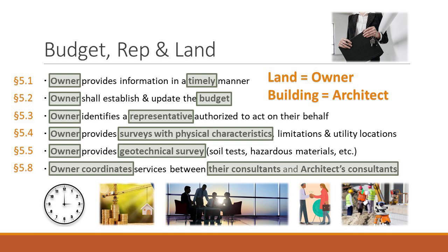And when the parties start talking about what supplemental services will be necessary for the project, you put a check mark or an X in one of those two columns. So if there is an X in one of the columns, for one of the rows, in 4.11 that's checked off as owner, this is an obligation to provide whatever those supplemental services are. So one of them might be structural, might be civil engineering. You've got to provide a civil engineer. Okay.